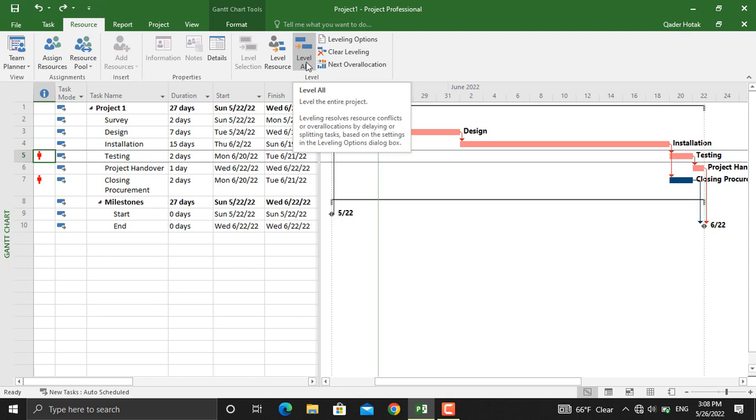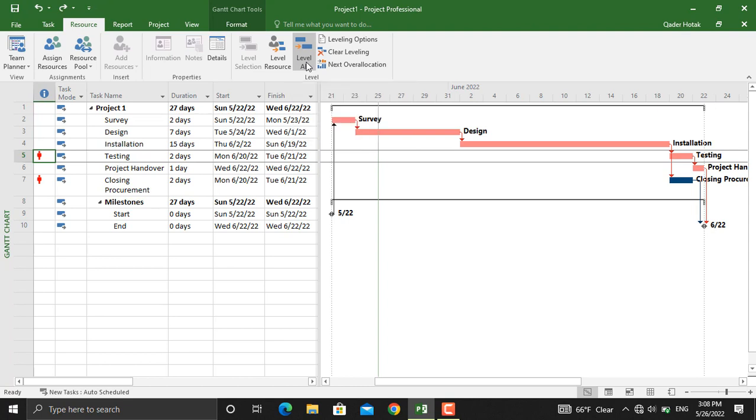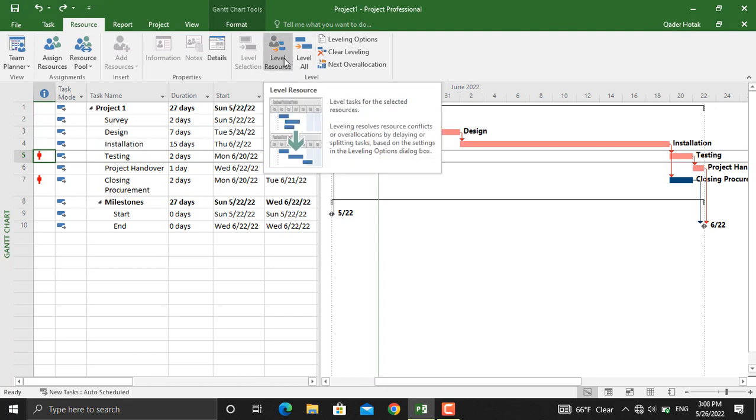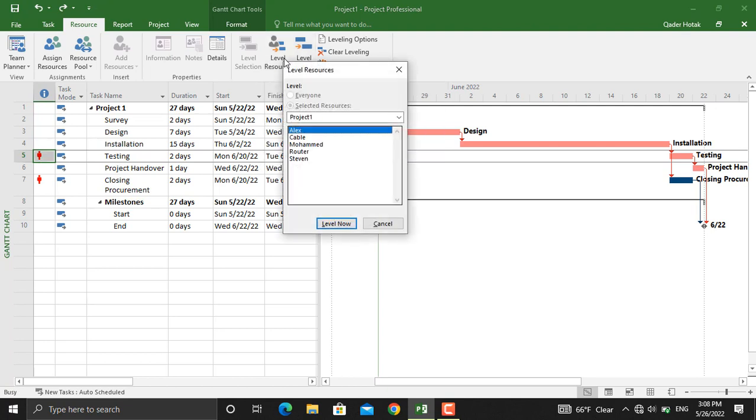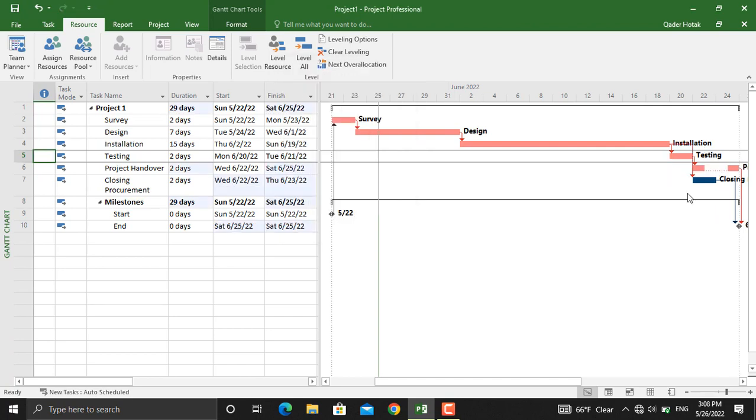Let's see the differences. For example, if we click level resource and we will click on Alex, level now. What it did is the part that belonged to Alex was moved after this closing procurement was completed. This is one method. I will undo this.